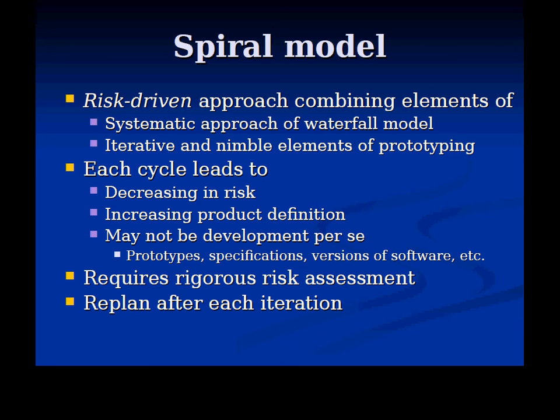And sometimes seeing it actually changes their sense of what the priorities are. It took me years to really think about this because stakeholders are smart folks. And you think they have a vision of what they want, and you can deliver the vision, and they don't need a lot of imagination. They must be conceiving how they want the system. But often they can't really guide you until they see something concrete, until that's in front of them. Then they'll realize, oh, I really want this more than that. And it's that feedback from them that often can occur when you have an incremental deliverable.